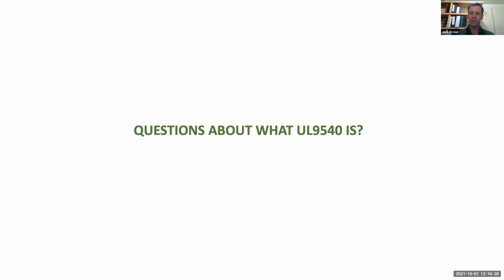Yeah, and further to that, some of the tools we have built in, the links we have built into this presentation, which you'll get by email afterward, should help guide you there. The table stakes for this is that you have a building block that's 9540 compliant. And then after that, whether it's installing multiples of that building block at a given residence with some kind of a space separation requirement, or whether it's simply that, an expansion of that makes logical safety sense to the inspector at that particular site, it's really up to you to get that work done ahead of time, provide the documentation to the inspector you'll be working with, and have them give you guidance prior to you starting to fully design it and permit the system.